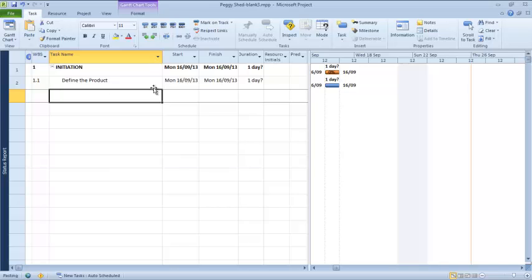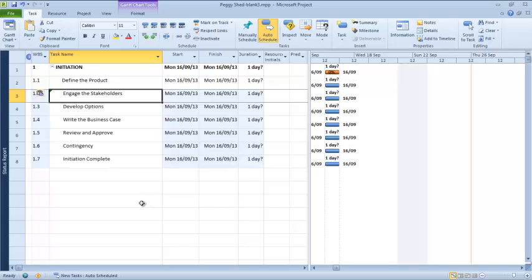Now we just paste in all the rest of the activities, the tasks, so we can see that effectively we've created the first stage of the work breakdown structure. We've got start dates on them, and the start dates are essentially the project start date at this point, which we said earlier. And the duration, it just goes, you haven't told me yet, so I'm going to make that 1. And we can see how that's represented in this Gantt view over here.